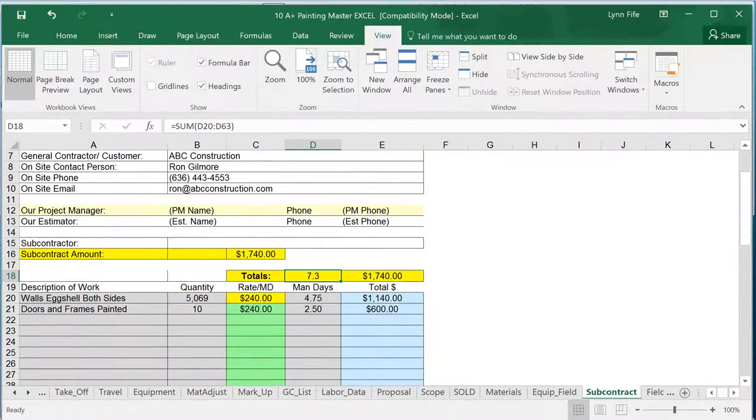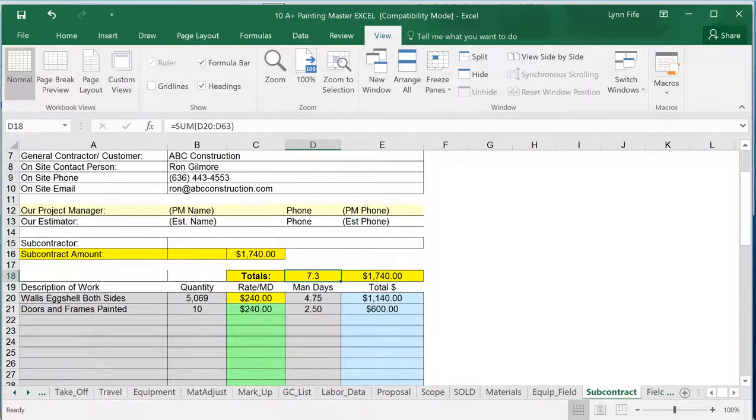If you use subcontractors, it'll automatically generate a report that goes to them. Here's your contract. Here's what you're expected to do. Here's the quantity. Here's my daily man rate. Here's how many man days we have for it. It'll automatically hand that off to your subcontractors if you use that.